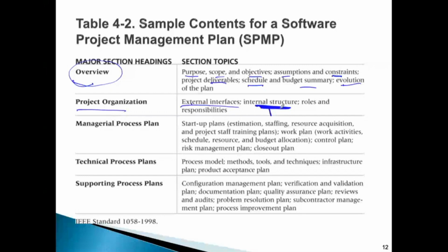So then you have other options, and you have to state them. For example, we will mitigate the effect if it happens. So how? You put the necessary steps that you're going to do. If the risk happens, we will do this and this and this, and this will reduce the impact on us. Or you transfer the risk to someone else. Transferring the risk is basically done through insurance.